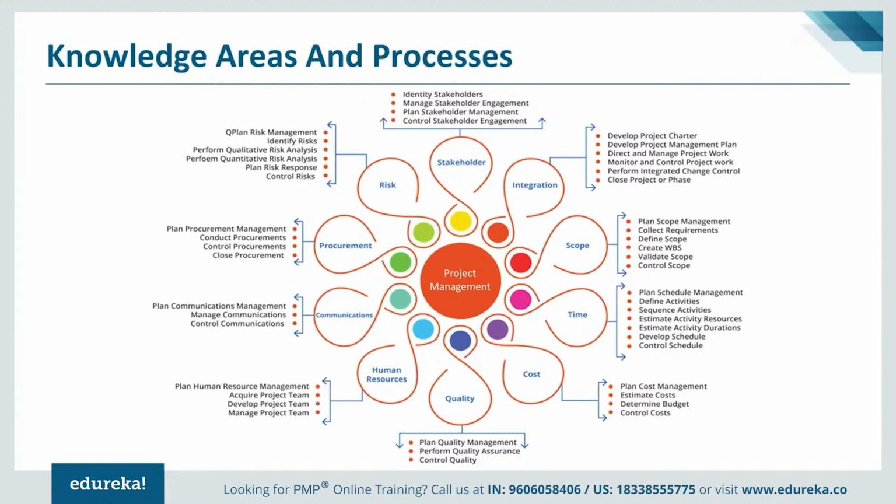Once we have the plan in place, then we need to manage and control it effectively. Then comes the procurement management. This is where again we'll come up with the procurement management plan upfront, and then we just execute that plan. So what have you decided to outsource to the vendor? How much of it? And then which vendors, and how to select them. So all of that will come into the picture. Then you start conducting the procurement activities, and of course you will control it. And once the project is over, then you will do the closing of procurement, which is nothing but contract closing.